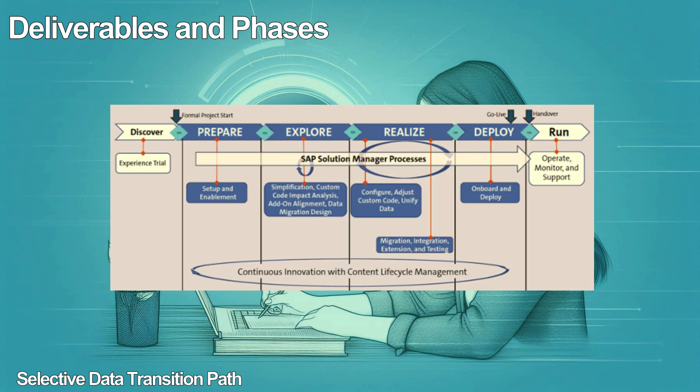Let's walk through the major project phases and key deliverables. In the discover phase, the team accesses the trial system to understand the innovations and functionalities of SAP S4 HANA. In the prepare phase, apart from project kickoff and project management activities, the team completes setup and enablement activities, performs custom code analysis to identify changes, retires unused code, modifies incompatible code, and provides high-level estimates. In the explore phase, the team sets up the sandbox environment from the current production environment, carries out the fit-gap analysis, and prepares the product backlog based on delta design workshops.